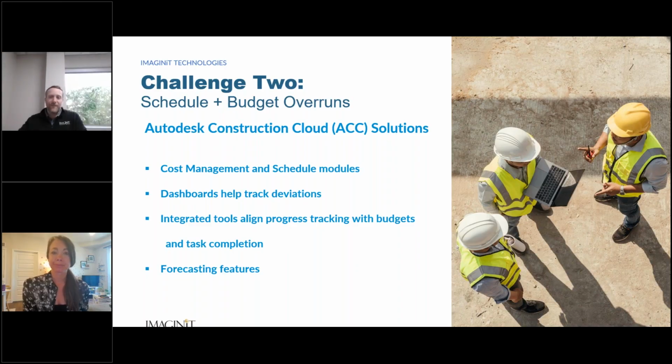Now, for the schedule piece specifically, a cool thing that Autodesk supports, and Lisa maybe alluded to it a bit, is that schedulers might manage their schedule within external tools like Microsoft Project or Primavera P6. Instead of actually building the schedule out within the Autodesk Construction Cloud, we're able to allow those schedulers to work in their native solutions, but still import updates and impacts to the schedule within the Autodesk Construction Cloud.